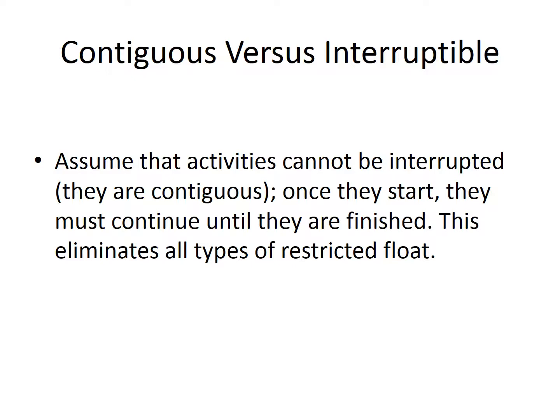It gets a little bit more complicated when you introduce the concepts of interruptible versus contiguous activity. Assume that activities cannot be interrupted. That means they're contiguous. Once they start, they must be continued until they are finished. That eliminates all types of restricted float.